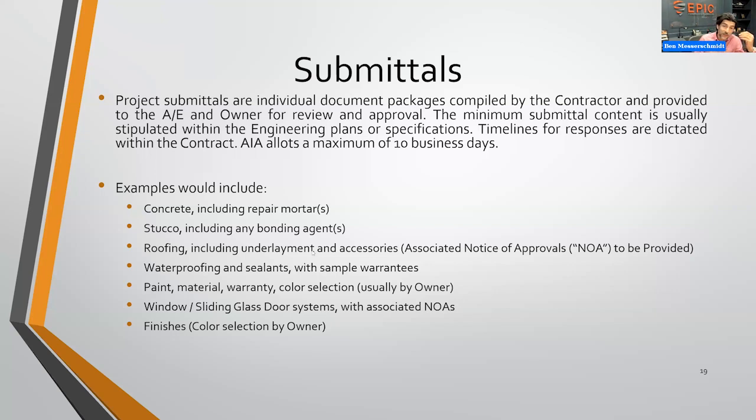Usually, I would say, a recommendation for decks, like when you have split slab construction where you have a structural deck, a waterproofing layer, and a topping slab or finishes or pavers or whatever have you, I would strongly recommend a 10-year at a minimum, because you don't want to be ripping that thing up every 5 years, basically, because that is creating a submerged condition or an enclosed condition that could wreak havoc on the actual material there. Like I said, sliding glass doors and windows for the NOAs, and then finishes.